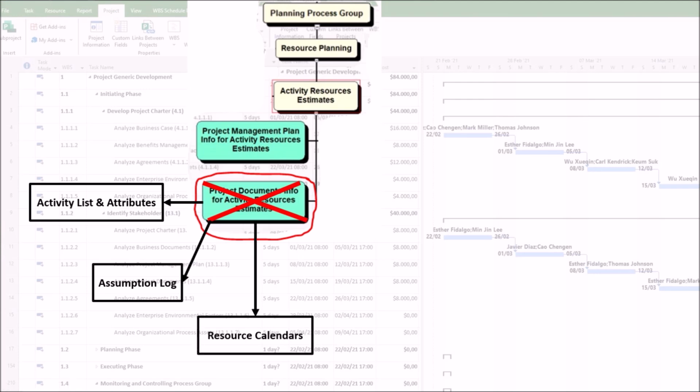3. Resource calendars. First, schedule delays. This happens when work is planned for a contractor who is on vacation or for equipment that is already booked on another project, causing immediate stoppages. Second, cost overruns. This happens if overtime or expedited deliveries are required because availability was not considered.